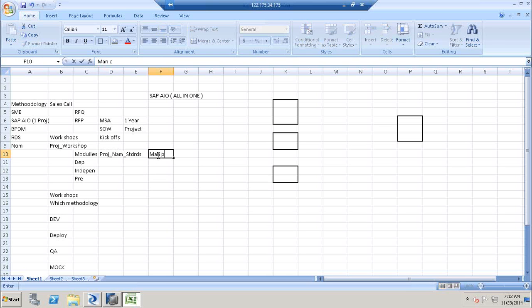manpower that is required for this project. So we'll be doing that initially when we send out an RFQ. We will also do an estimate like how many people are required for this project. But again, once we get a clear picture on this one, we will have to do a manpower estimate. So how many man hours do we need? How many people we require on this project? How many developers? How many testers?